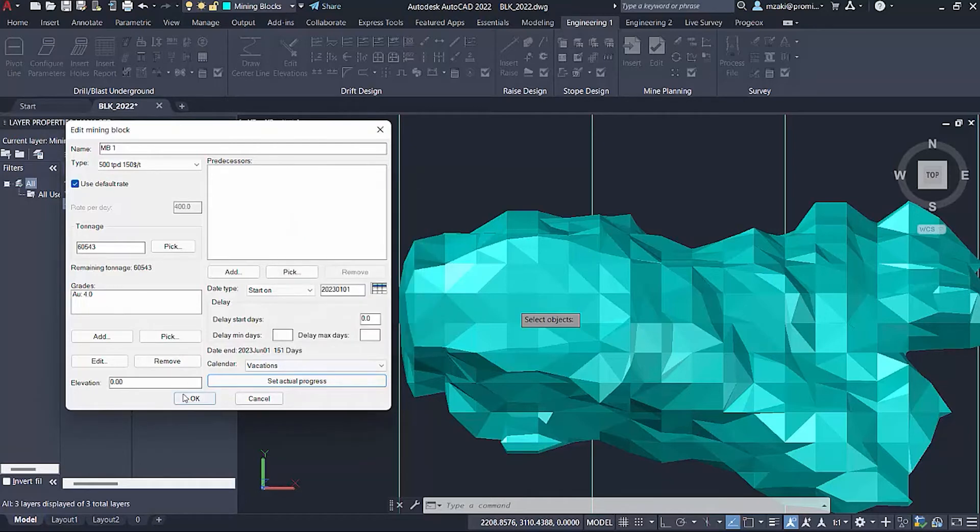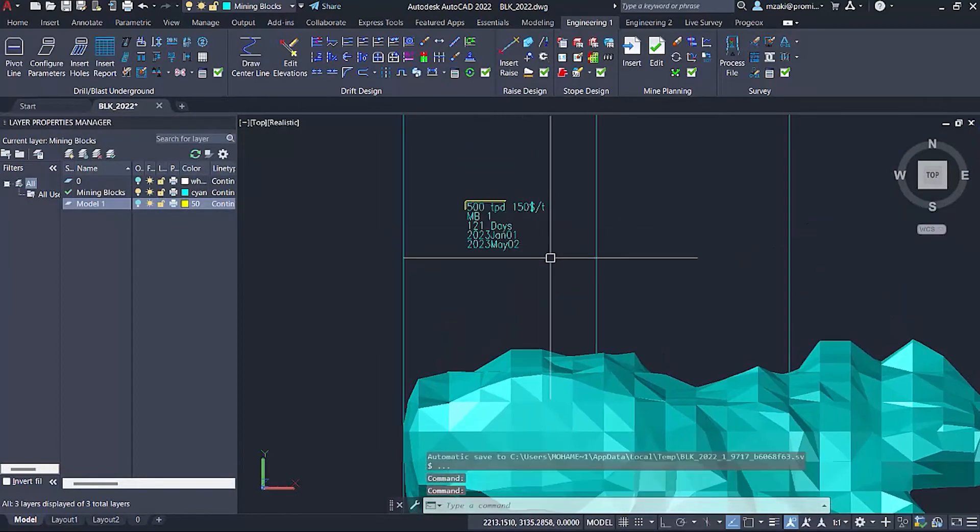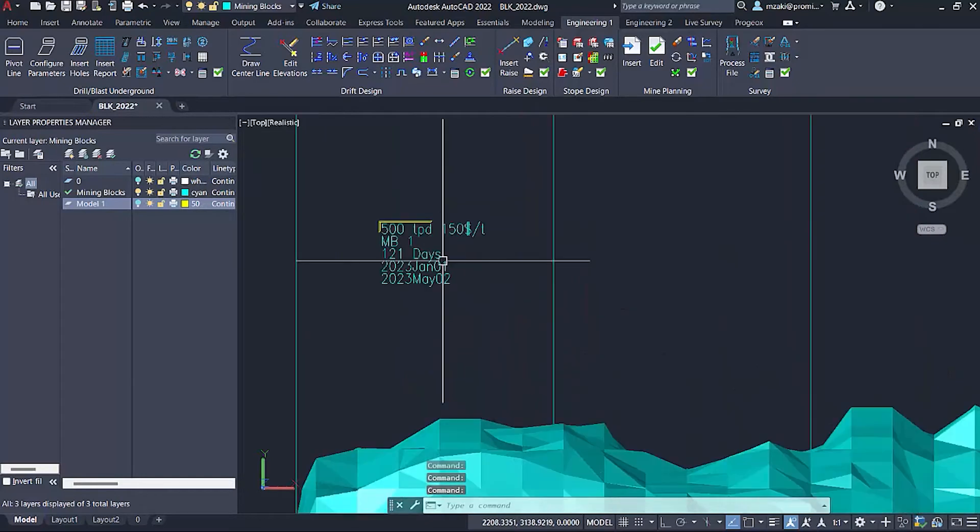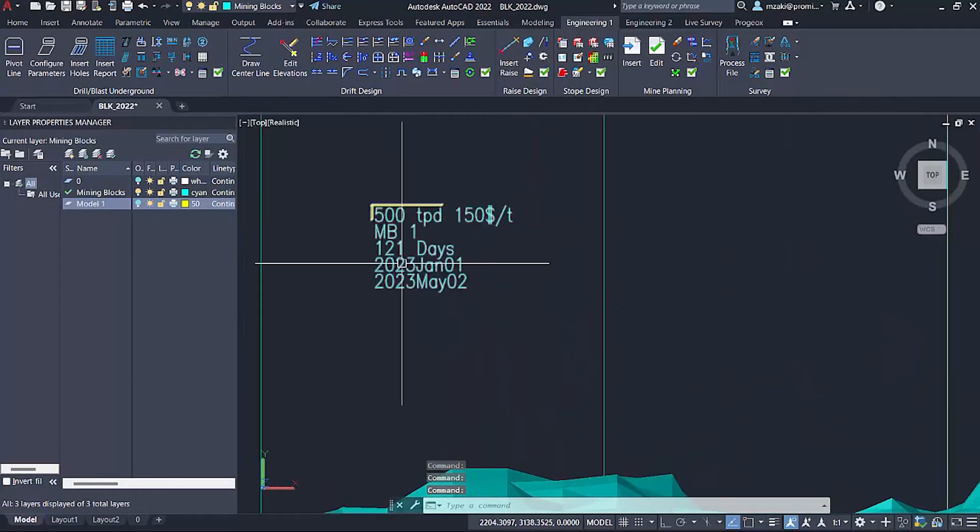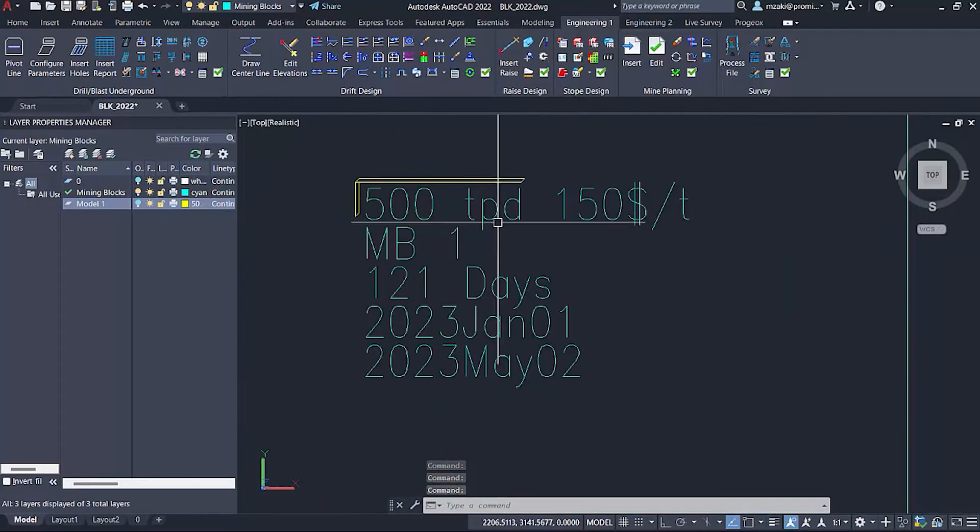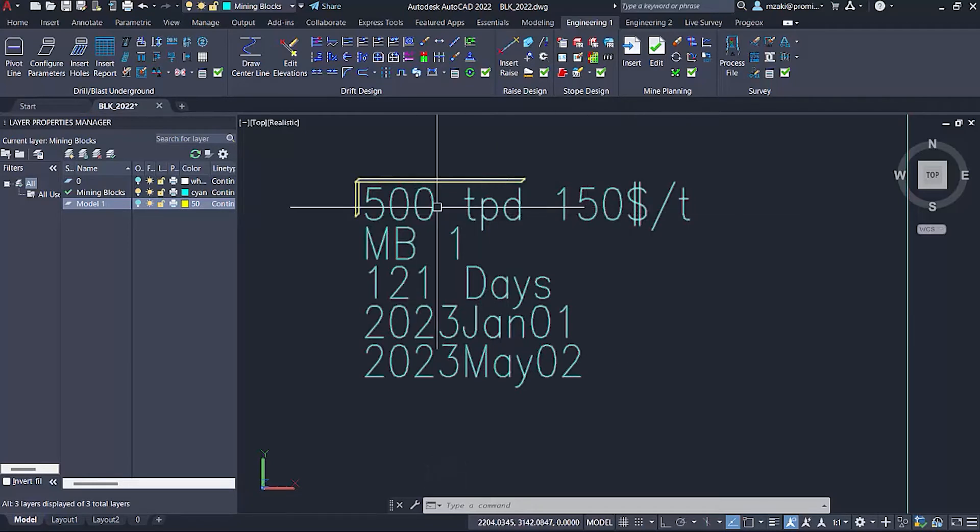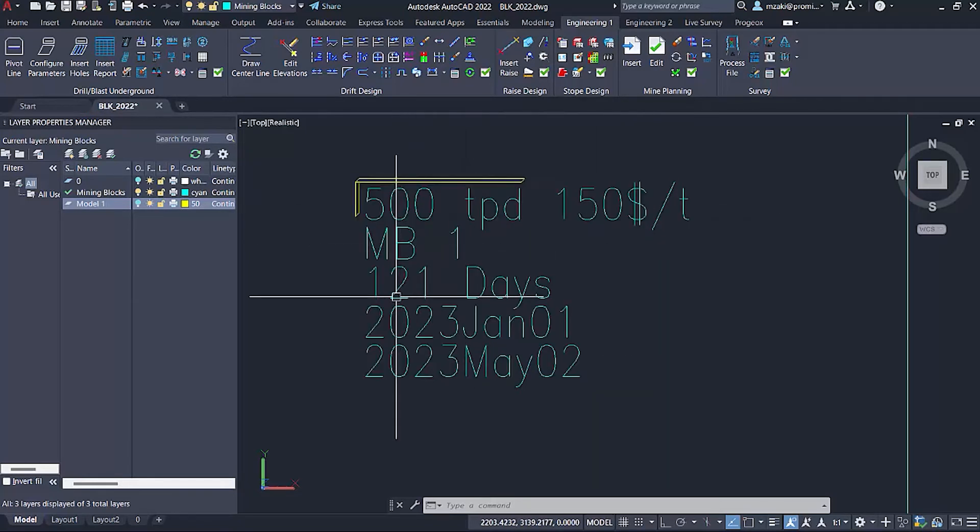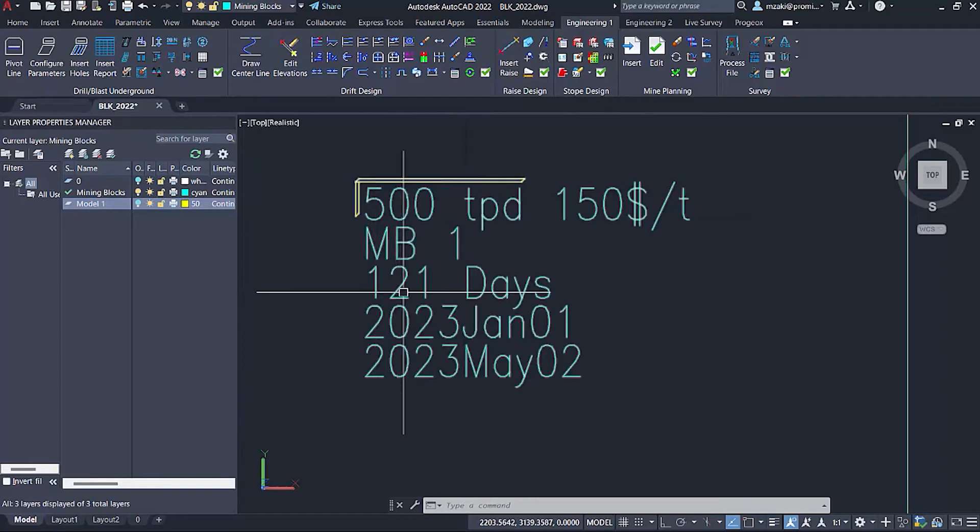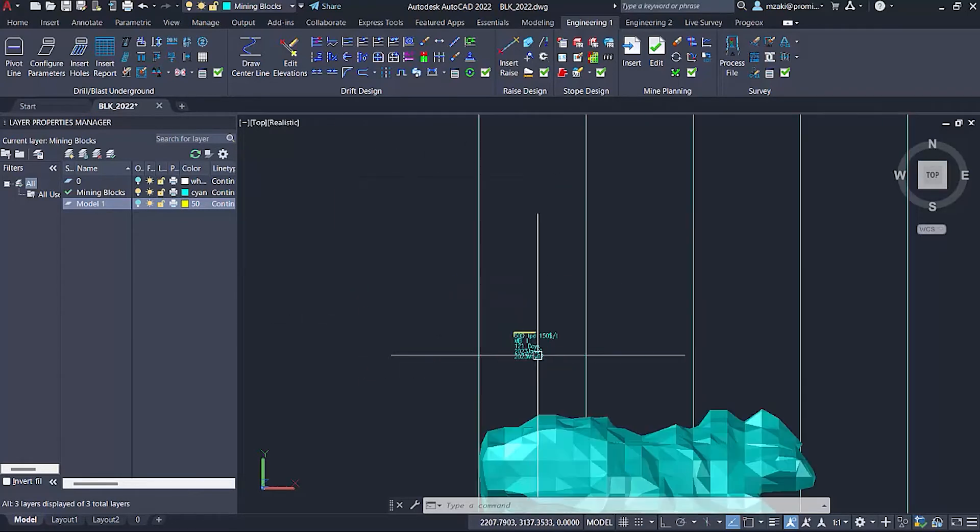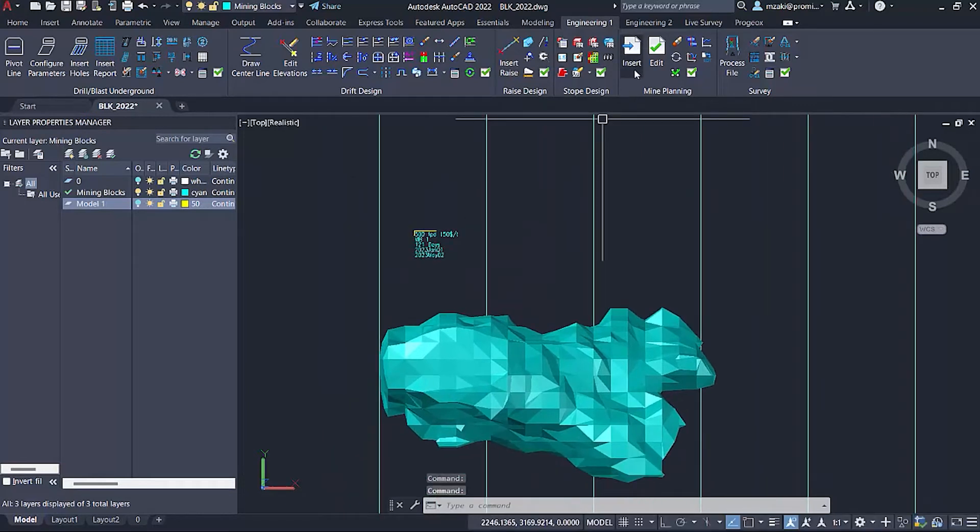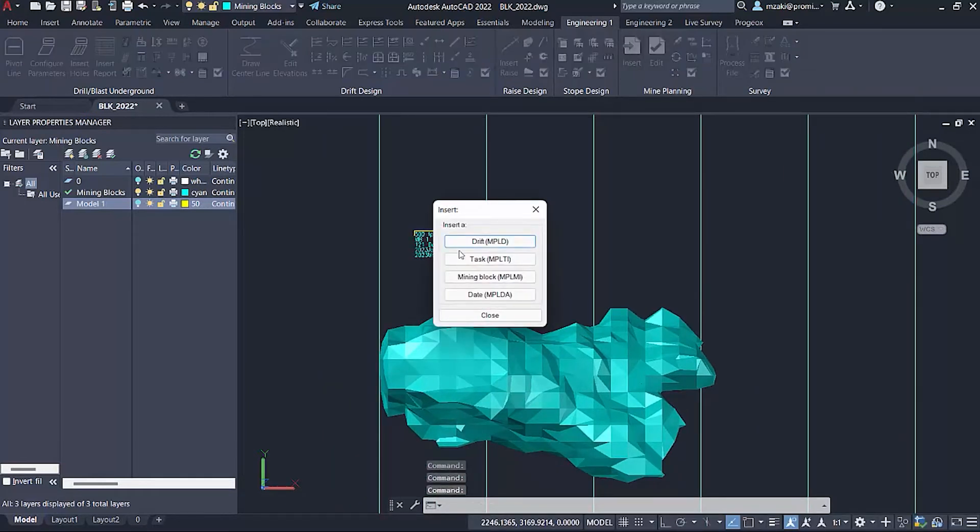Once this is done, we're going to hit OK. And as we can see, we have our attributes shown: 500 tons per day, $150 per ton. This is mining block one, it's going to take us 121 days, starting at this date until this date. Then we're going to repeat the same process for the other pieces as well.